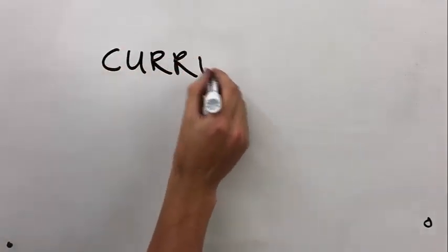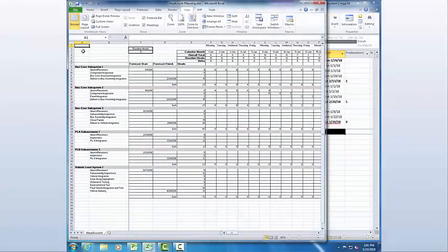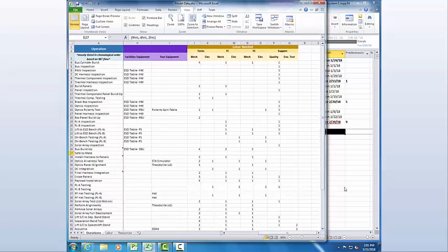In the current state of operations, this information is then entered into an additional offline Excel sheet created by our client to get a better grasp on the project scope. Data including set number, task breakdown, forecasted start and finish are recorded on the sheet. Once the employee specifications are received on a separate sheet, the scheduler estimates how many heads will be necessary to complete the job on time.